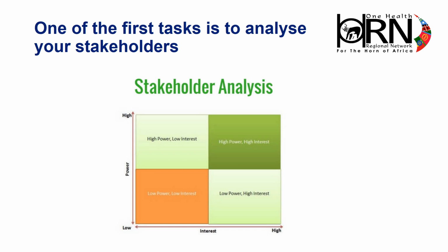Once all stakeholders have been identified, they will be placed on the diagram shown on the slide in the relevant quadrant, and then project team members would decide the most effective way of managing the communications and interactions. This communication management would usually involve 4 different levels of activity: manage closely, keep informed, keep satisfied, or monitor.